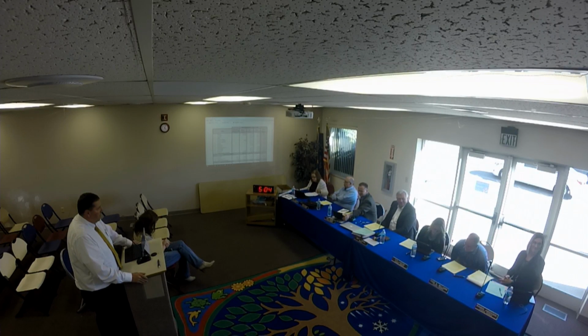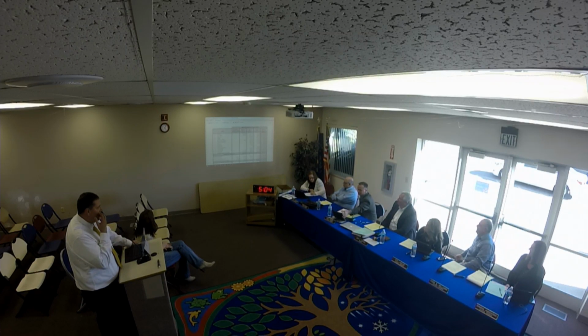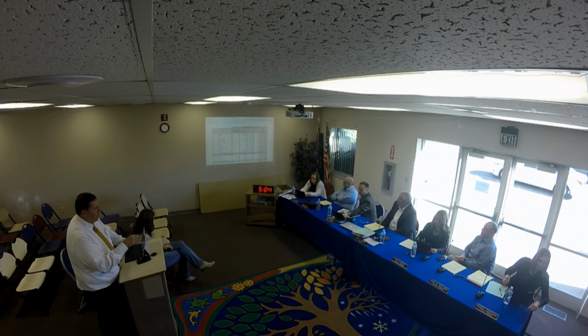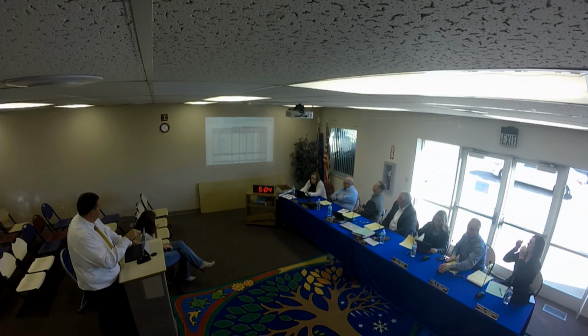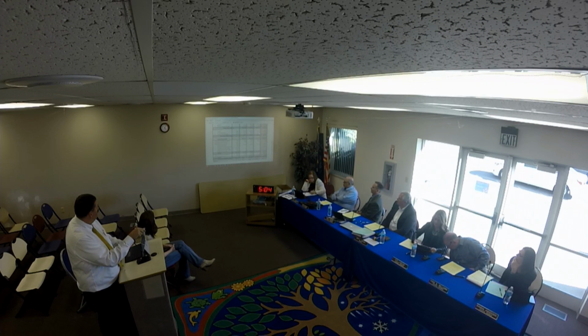As we have settled on the guaranteed maximum price, this is the breakdown of what that price is. As I go over these numbers, I'm going to pull up a different budget worksheet in just a minute, and show where those numbers tie back into our overall budget. The first number is what we call our sticks and bricks, which is the construction costs at $10,300,000. We also have our general conditions, which is right here.